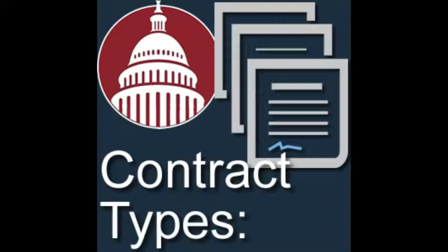So let me get to the conversation that I had with the program manager that came to my office. And this goes to how industry makes its money. On a firm fixed price contract, if you promise to deliver a printer by a certain time, the faster you make that printer, the better deal you get on all the parts, the more money you make on it. Because if you say you're going to sell it for $100, if you estimate it's going to cost $90, but you manage to build it for $85, you're going to make $15 instead of $10 profit. And that can be a big deal.